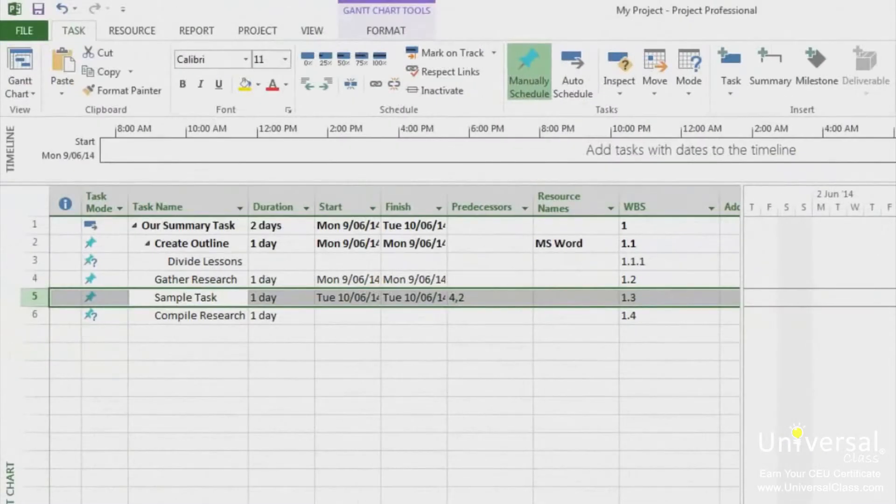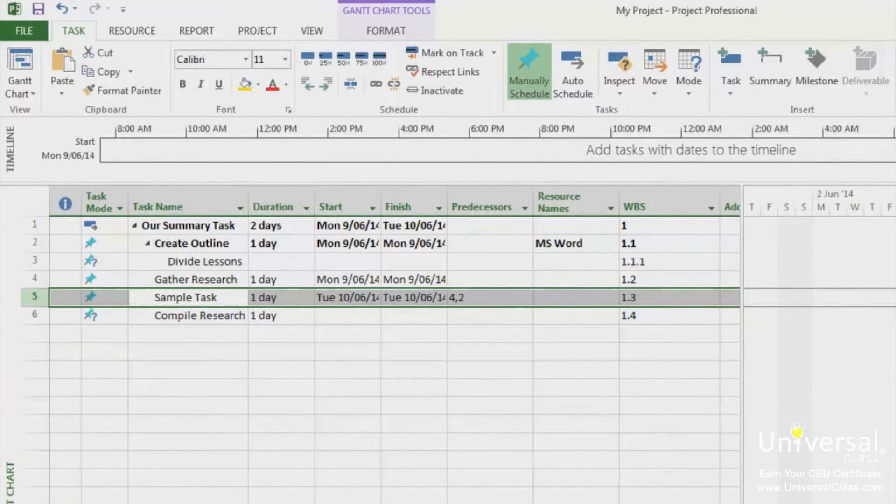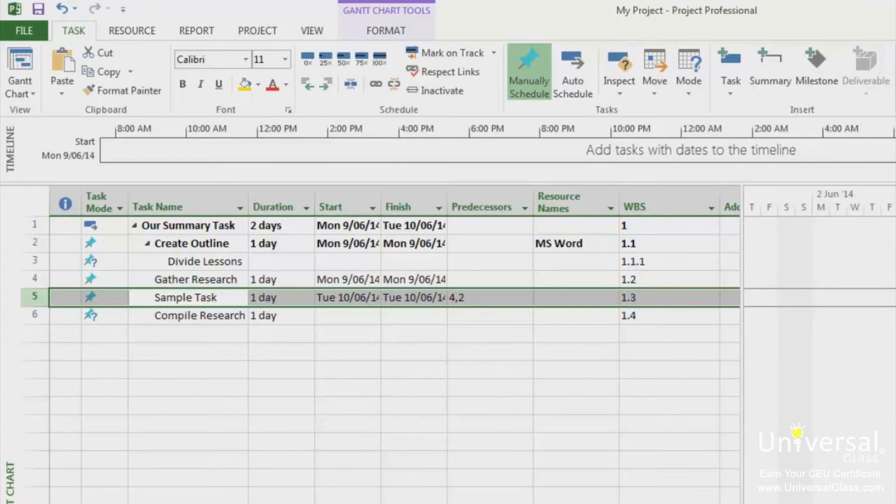Lag time occurs when you add time to either the start or the finish of a predecessor task. This causes a gap in the timing. Lead time, on the other hand, is when you subtract time from either the start or the finish of the predecessor task. This causes an overlap between two tasks.